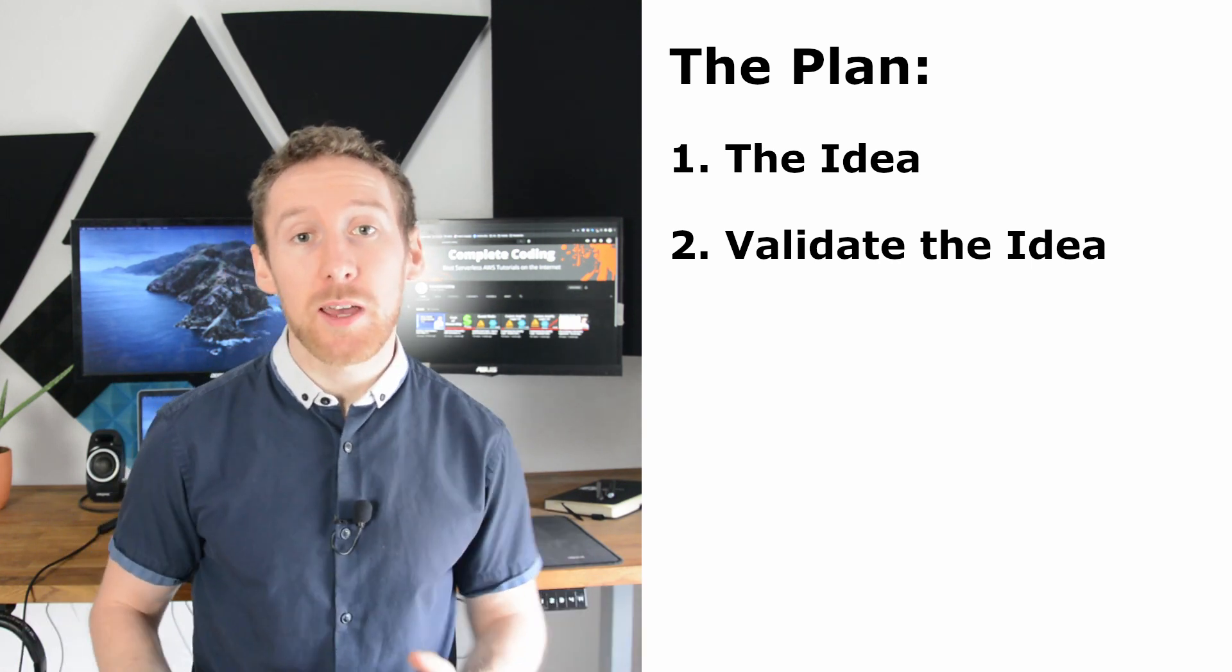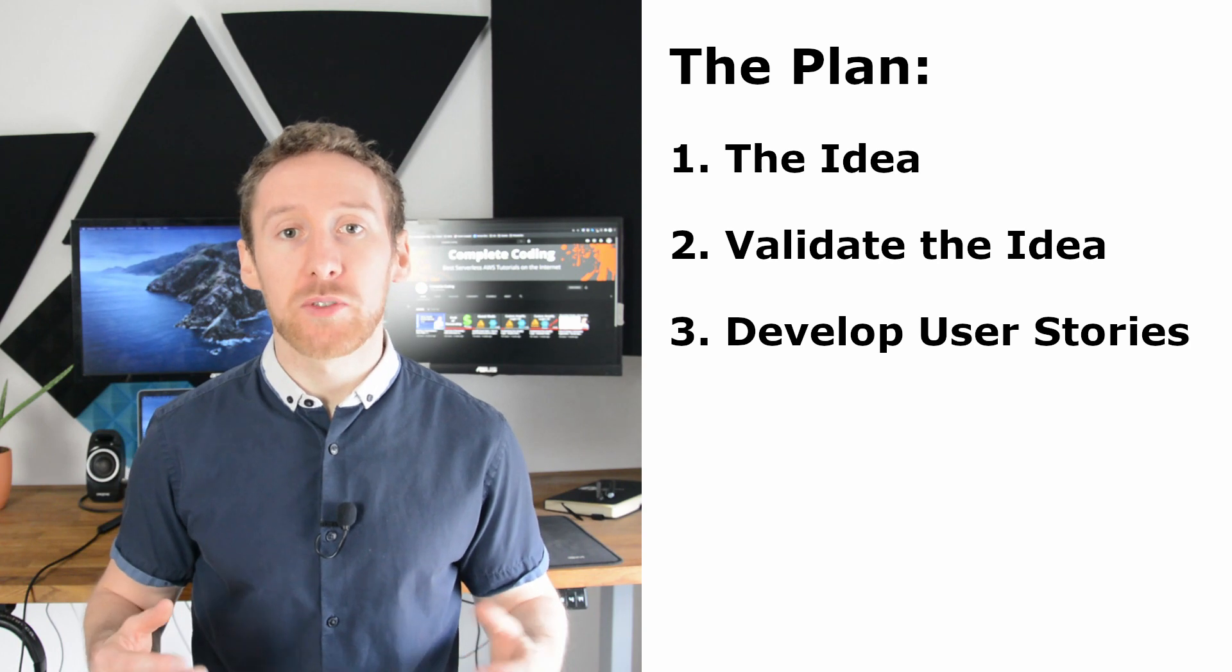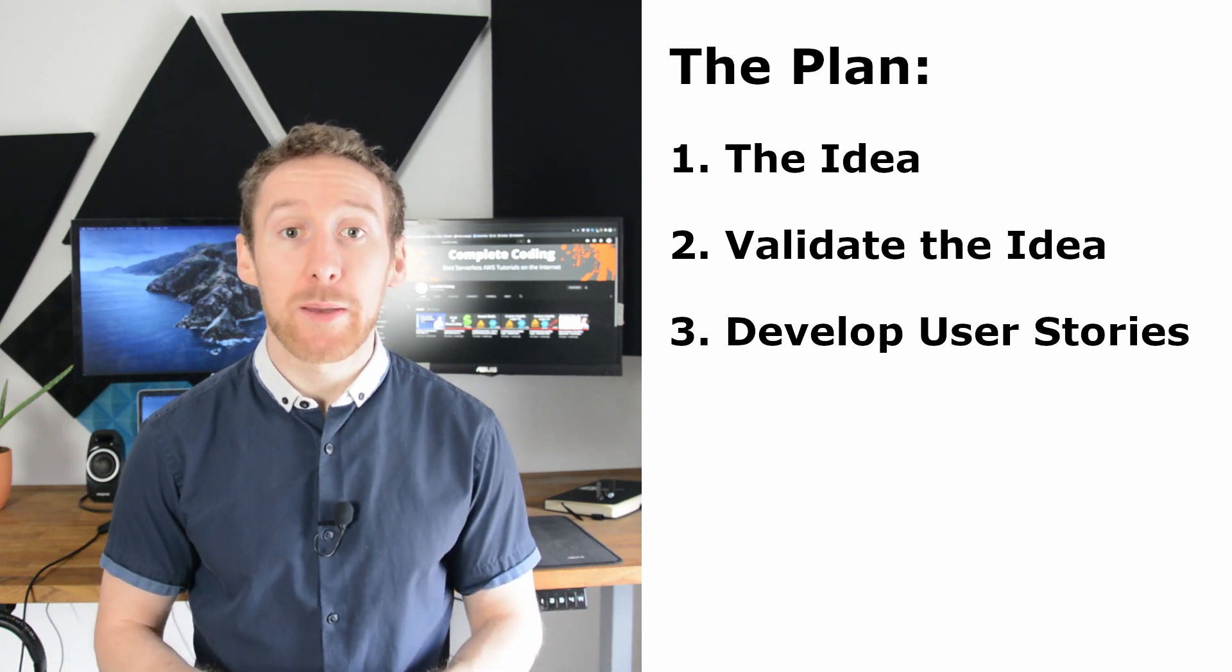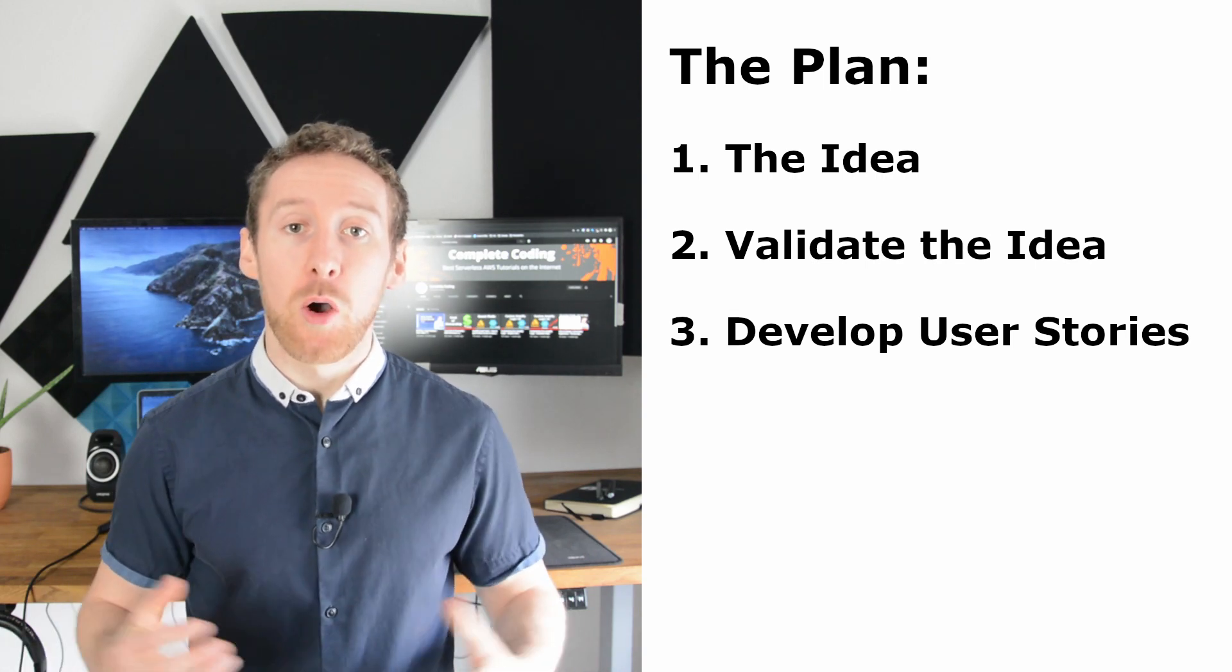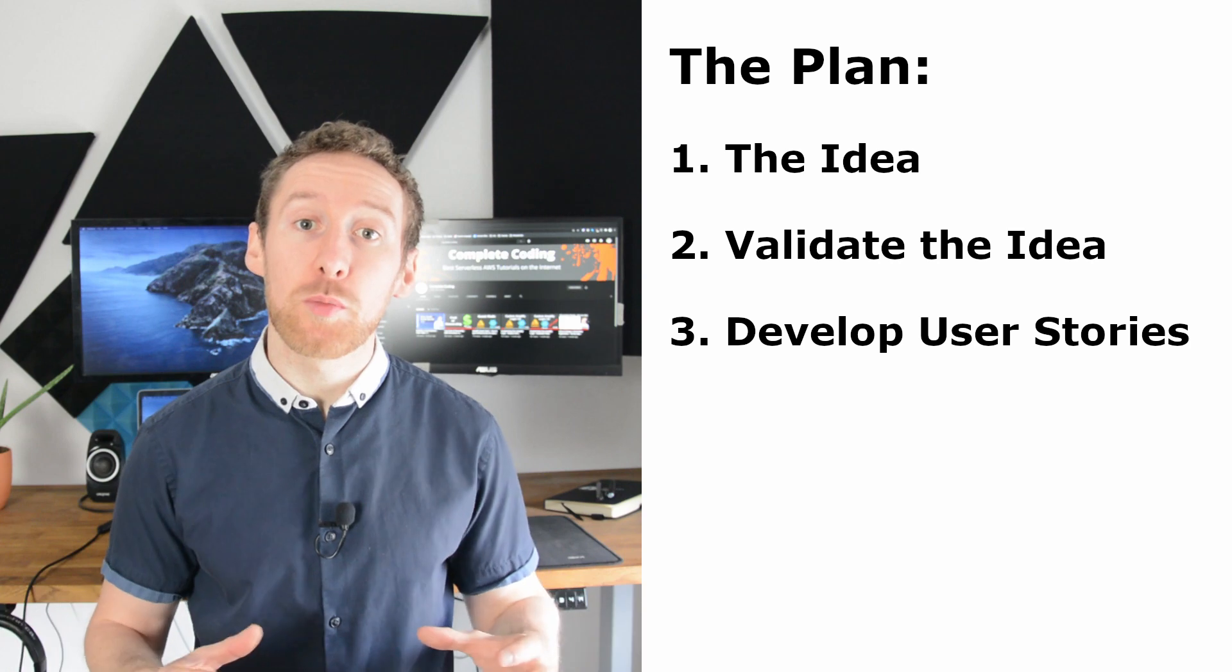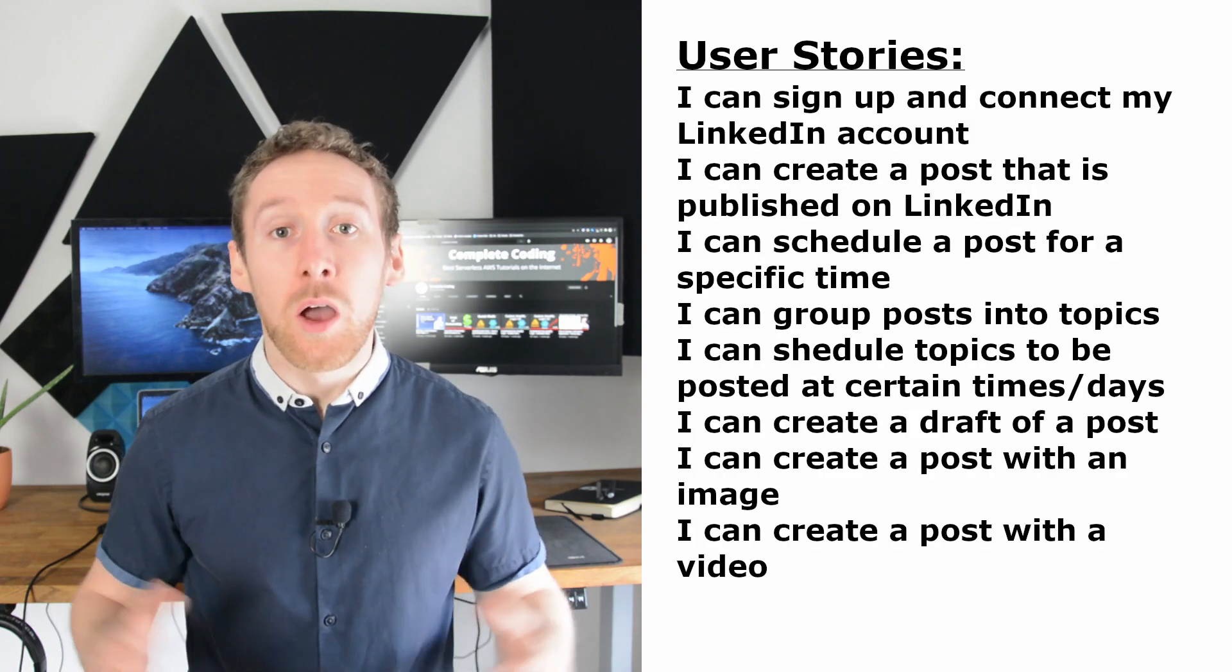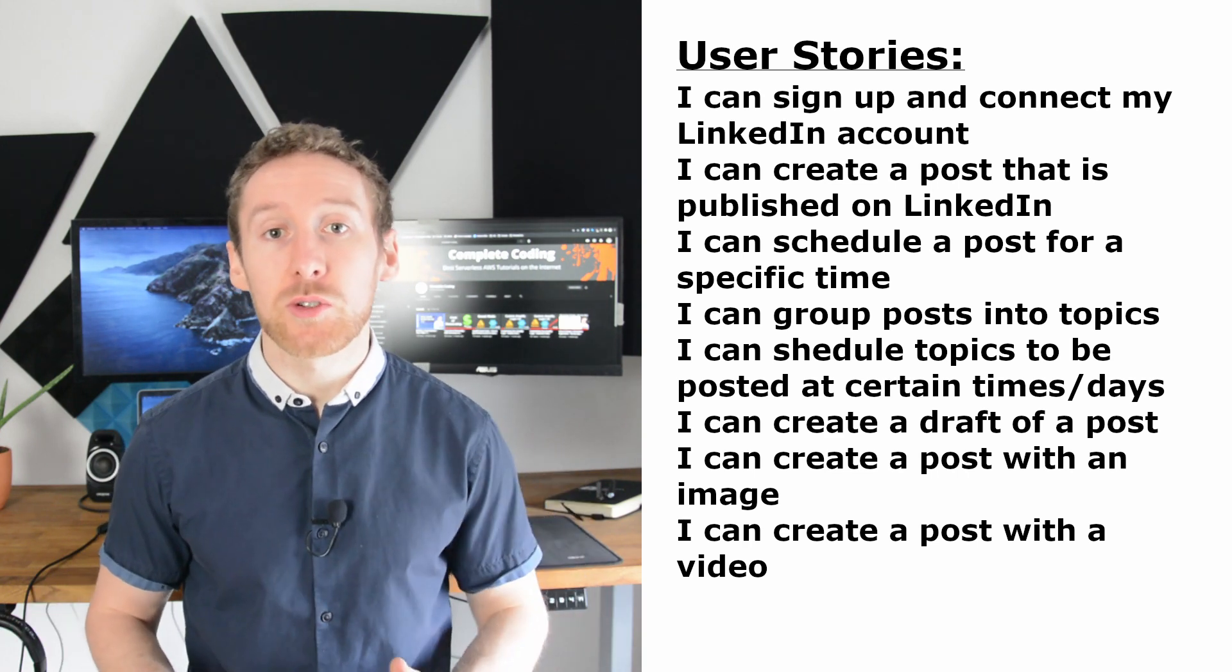The third step is to start doing a little bit more planning into how your product is going to work. This will involve starting with a set of user stories. These user stories can be as simple as I want to be able to post a message to LinkedIn, or it can be a lot more complicated than that, going into really fine details such as I want to be able to group posts together and schedule that post for a particular day of the week. On screen now, I've included a list of my user stories.